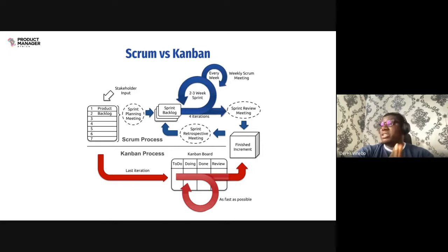And you actually abandon the ticket during the sprint, then move it back to the product backlog. So you can try to prioritize it or actually delete it entirely from your entire board. And then you have the sprint retrospective meeting.